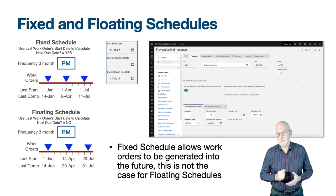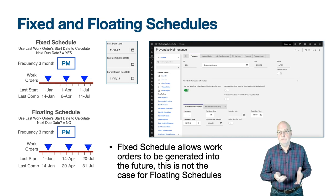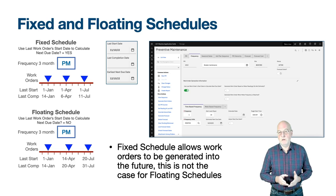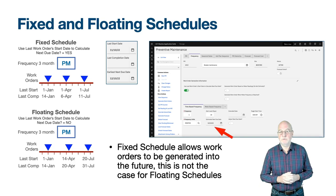In the time-based frequency tab, a frequency must be entered. The frequency units will be days, weeks, months, or years, and the frequency field must be a positive value — but it can also be zero, which is the default. A zero-frequency PM can be used for on-demand generation of work orders. To be certain no work order is generated, do not enter an estimated next due date. If one exists, a work order will be generated when the estimated next due date is today or in the past.